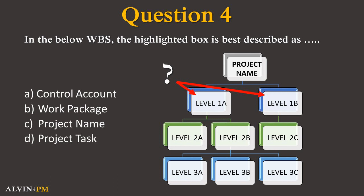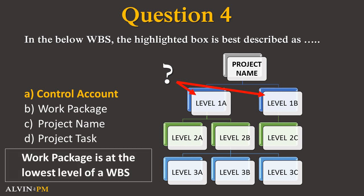Question 4. In the below work breakdown structure, the highlighted box is best described as — is it A. control account, B. work package, C. project name, or D. project task? The correct answer is A. The work package is at the lowest level of a WBS, while the control account is the higher bucket which consists of one or more work packages.